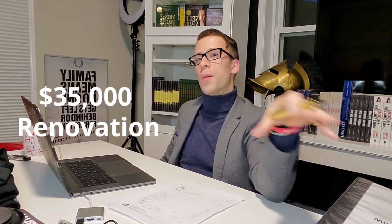The other thing that I'm doing with him is that I have a couple different projects all starting together. I'm hiring 3 new crews, but 2 of them I know people that have used them. I'm still running them through the same process. But this one, he's unproven. I don't know anybody that's used him, so I'm starting him on the smallest renovation. It's still a decent size, about a $35,000 renovation. I'm gonna start him on something really small just to see how it goes.